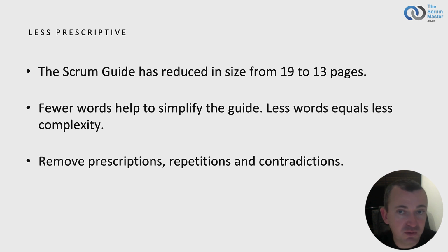Specific examples of where Scrum can be used that were added in the 2017 update to the guide have been removed. The optimum Scrum team size is now suggested at 10 or fewer, which is a slight change from earlier guidance. Reduced details on sprint, including sprint cancellation and the circumstances around it.